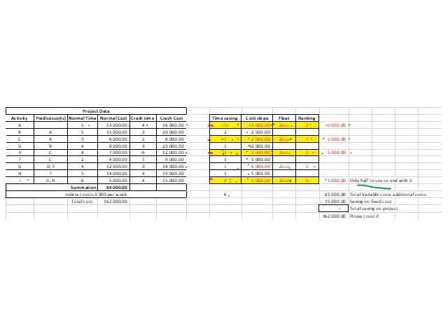And our cost saving is 5 times our 3 weeks here. So we have a saving of 15,000, and we have an addition of 15,000, and thus we have a cost implication of 0, and our project cost stays at 162,000. Please make sure that you have a look at the presentation or slides of the previous ones if you struggle with how to calculate the cost slope.